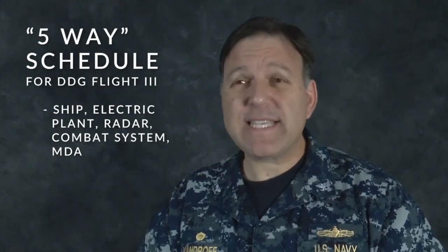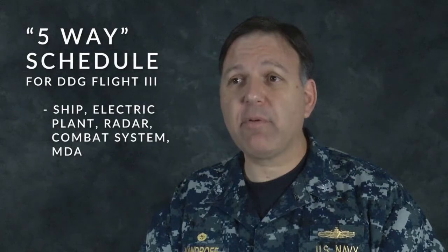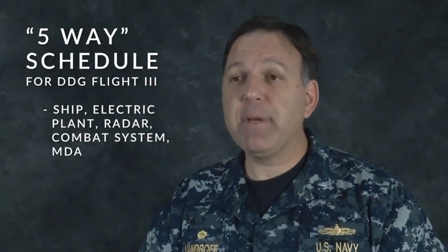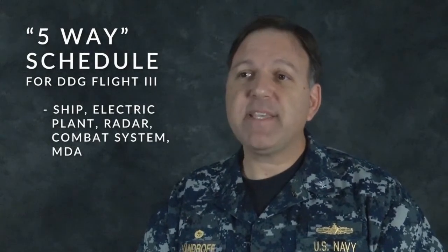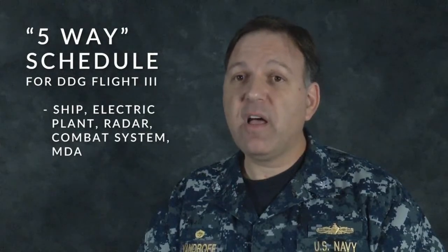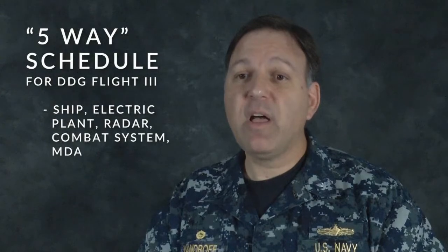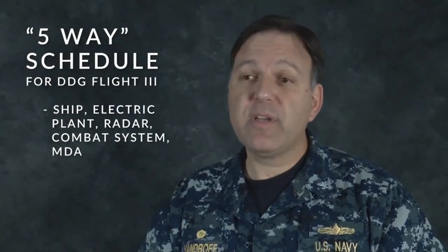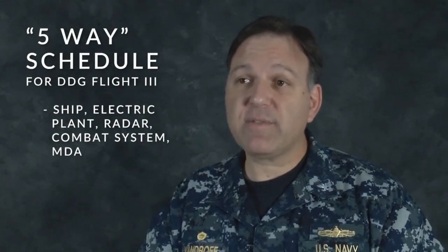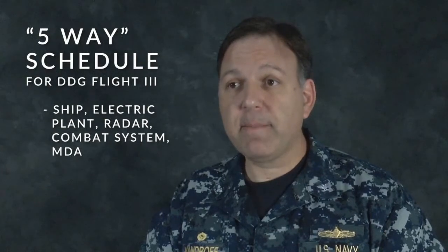This was and is an incredibly complicated program. You had a ship procurement and building schedule that had to be synced up with the developmental schedule of the radar, that had to be synced up with the developmental schedule of the combat system to both connect the ship to that radar and service the radar, which was another program.